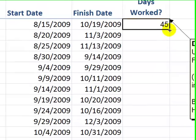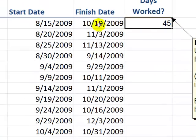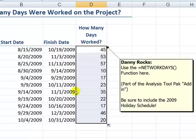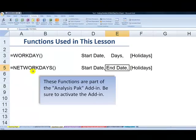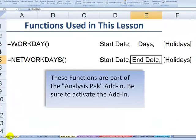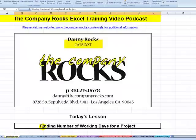There will be 45 working days when we schedule the completion to this date. We'll use NETWORKDAYS to exclude weekends and non-working holidays. Copy that down. You learned how to use the WORKDAY function and the NETWORKDAYS function to find the actual days worked on a project. I'll see you in the next lesson.